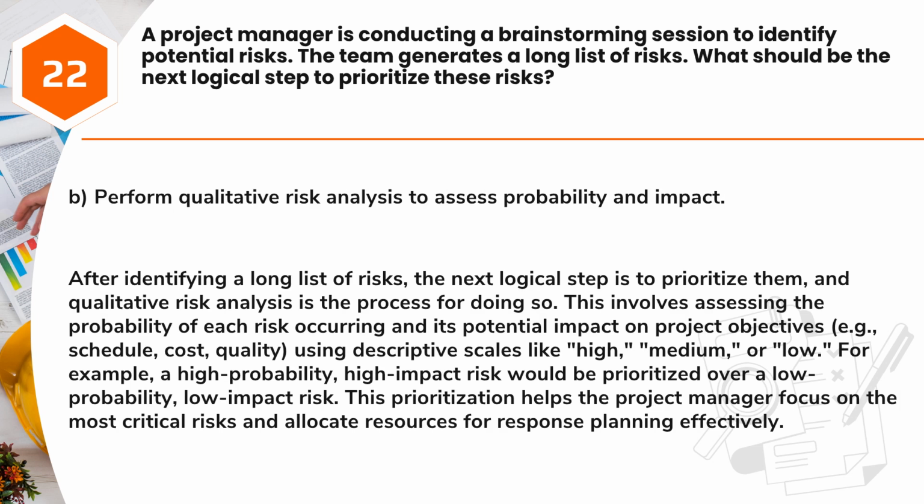Answer: B. Perform qualitative risk analysis to assess probability and impact. After identifying a long list of risks, the next logical step is to prioritize them, and qualitative risk analysis is the process for doing so. This involves assessing the probability of each risk occurring and its potential impact on project objectives, for example schedule, cost, quality,